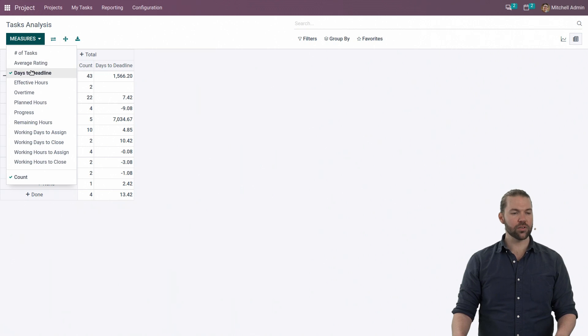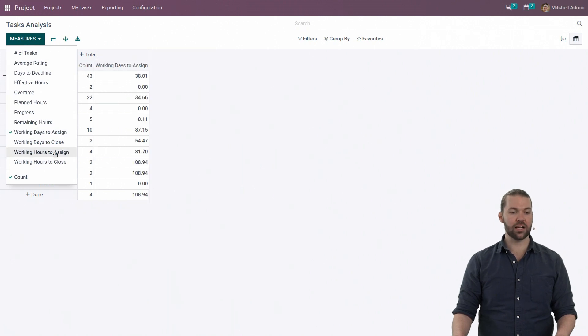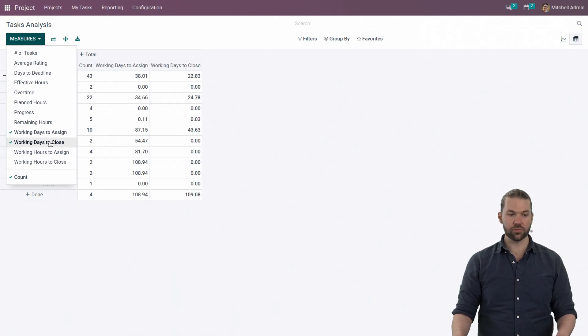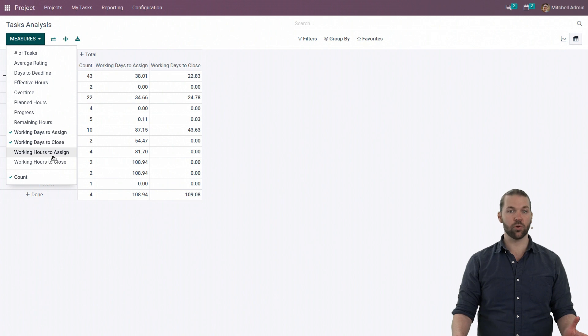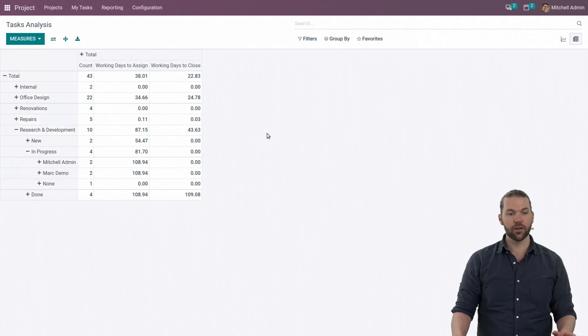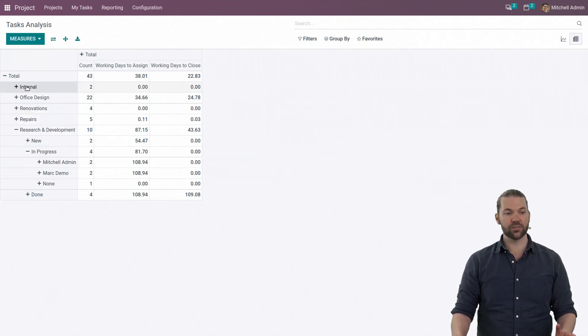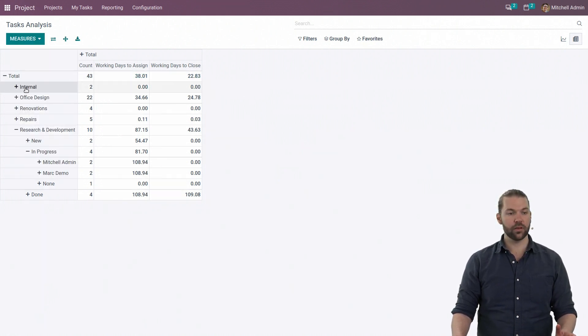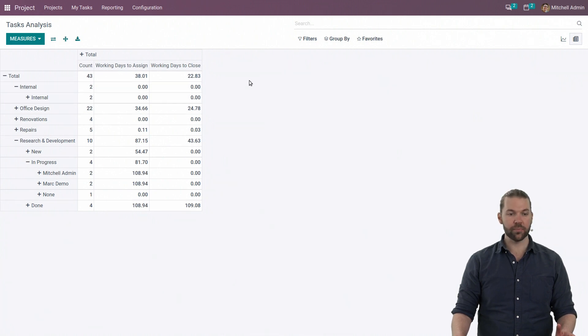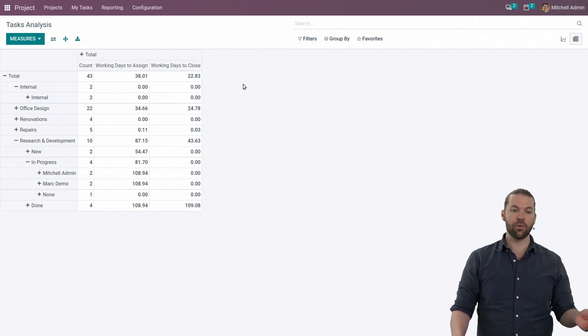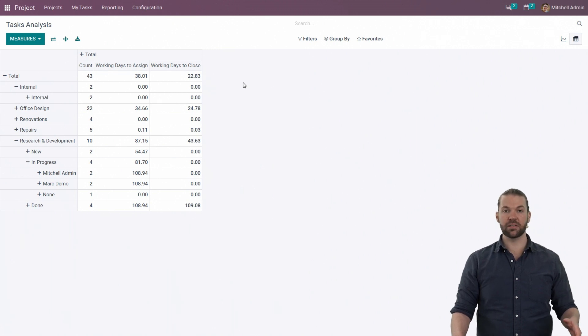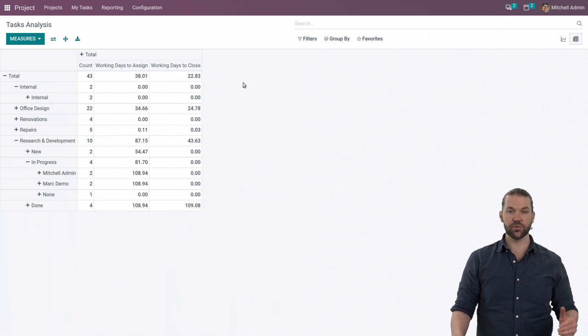We can also look at the working days to assign and working days to close, whether we choose days or hours. The way this works, essentially, it's going to look at every single task or project we've got going on - how many days has it been since it's been created to assigned? The moment a task enters the new stage, that's when the clock starts counting.